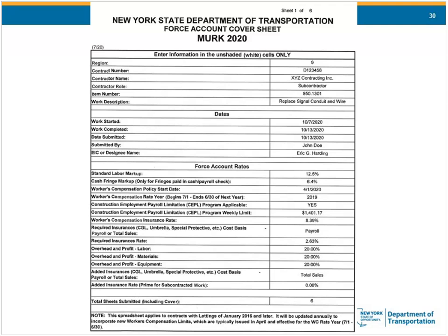Normally we don't adjust the profit and overhead, 20% on your normal D jobs. This will change for where and whens. And the added insurance, CGL for the prime, only if the prime's general liability is based on total sales. Total number of MERC sheets in the package is the last cell at the bottom.